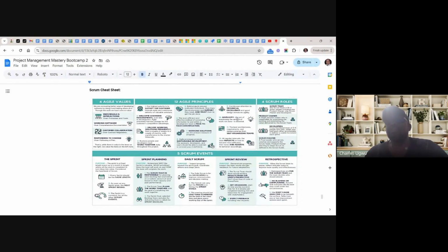So what I mean here by simplicity is that when we are writing user stories, everything we do must be very simple. In Agile, we don't want to create ambiguity or long grammar. If we're writing a user story and it becomes like 3 statements, you have to break it down into 2. It must be very short and simple, and that's what everybody must understand.